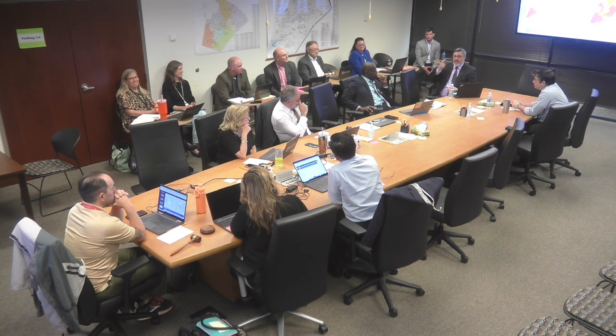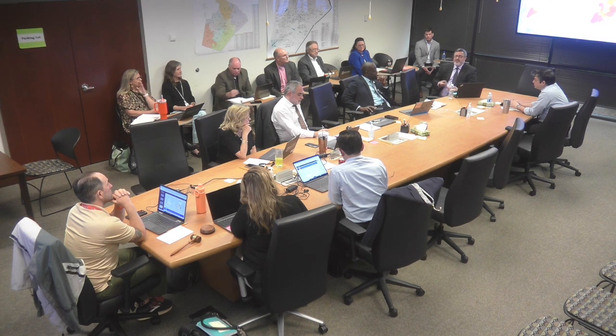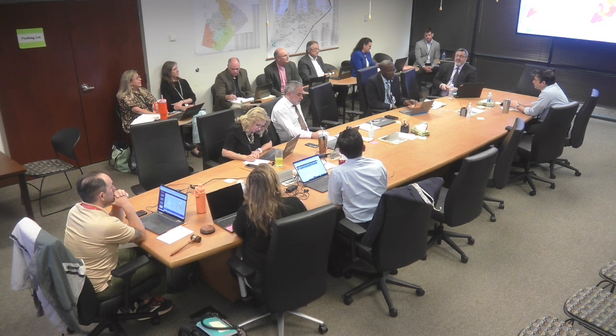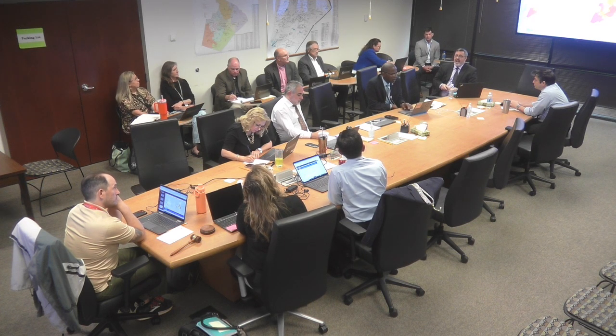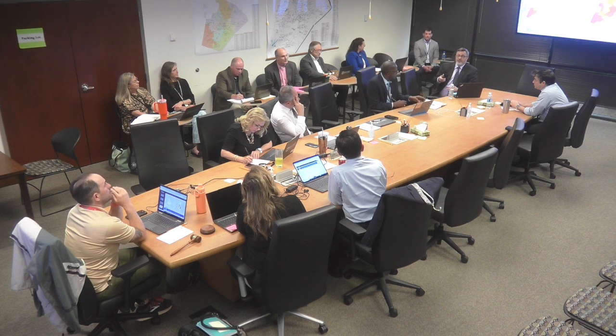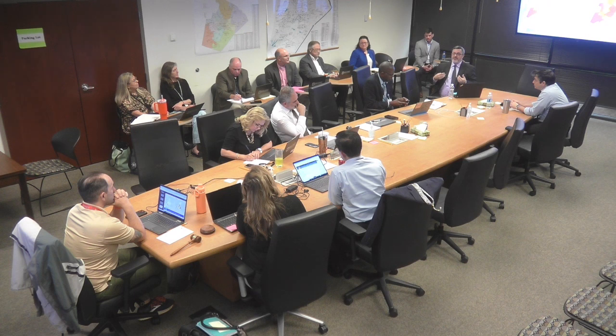We are using our capital improvement plan to try to build new schools in those particular areas to reduce our reliance on mobile units. In certain areas, though, that's very difficult because of the lack of available land to find a school site big enough. And again, getting back to the restrictions, even if we had the funding and the time and energy and the swing space to move everybody, because if you're going to move those kids out of the mobile units into the building and do that construction, we've got to have a place for them to go to school in the meantime for the 2 years that you're doing the construction. And so we just don't have that swing space available as is.